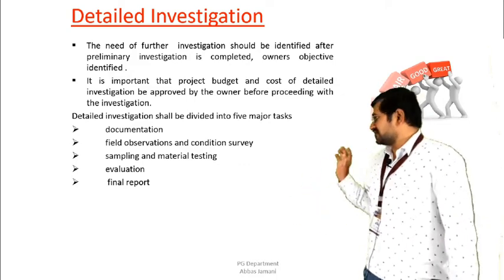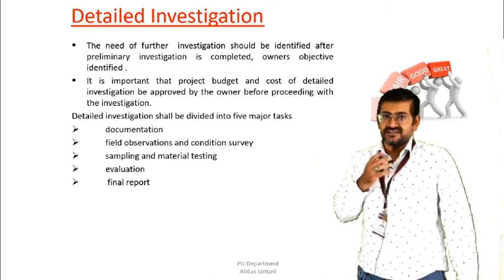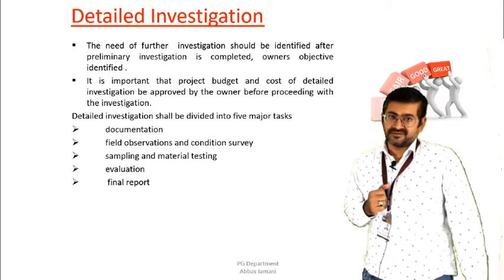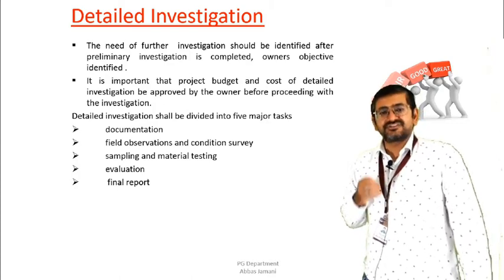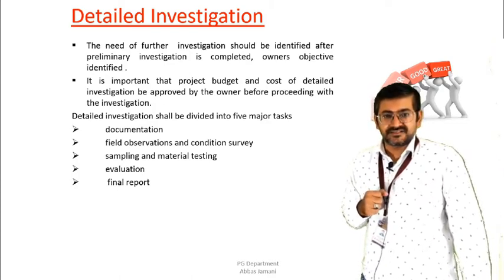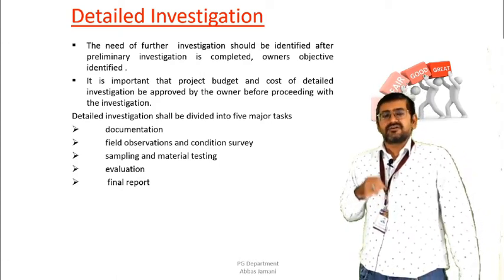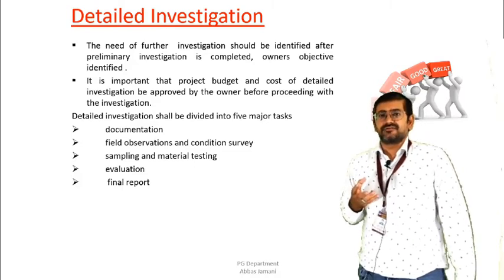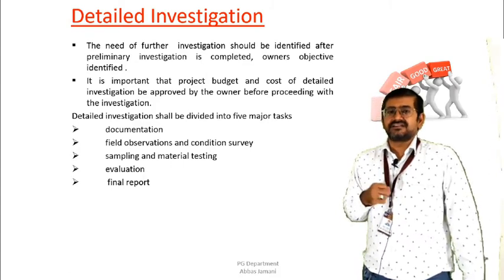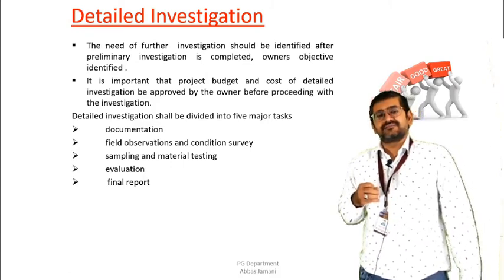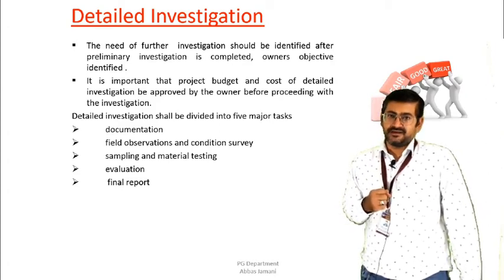So the objective or the need for the detailed investigation is set when the preliminary investigation is over. It is important that the project budget and the cost of detailed investigation be approved by the owner before proceeding with the investigation. For any exercise that we carry out during this process of evaluation of the structure, we need the approval of the owner. That is why the project budget should be approved beforehand, before proceeding with the stage of the detailed investigation.